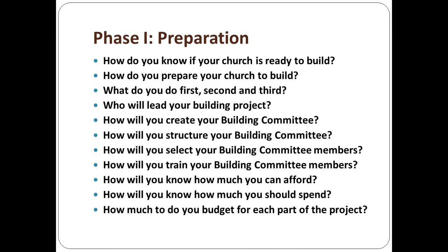And again, this is a rough estimate. Applying the due diligence to determine what the land will need to develop it is your job, to get the industry professionals in there and to do their work so you can nail it down with a correct estimate of the cost. Now, the structure. A lot of what you can spend on the structure will be determined by how much you have to spend on site work. And site work is an unknown. We guess at it until you get more firm numbers.